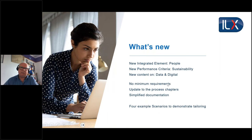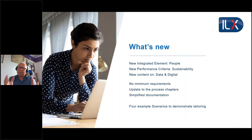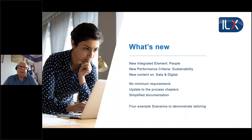A major new integrated element: in the past PRINCE2 said it was made of four elements - environment, principles, themes and processes. We now have 'people' at the heart of those things. So we have the project context, practices, processes, and principles all interacting - but with people at the centre. The six performance targets (time, cost, quality, scope, risk, benefits) have also been expanded to seven with the addition of sustainability.